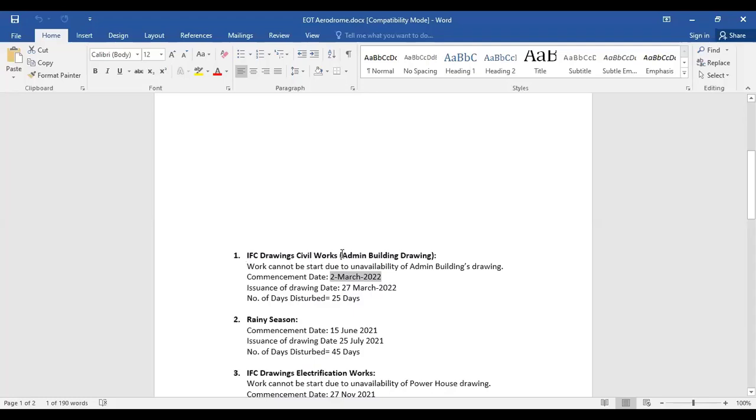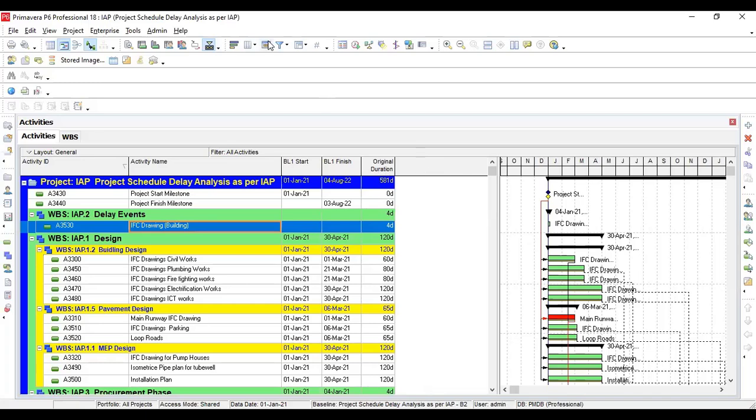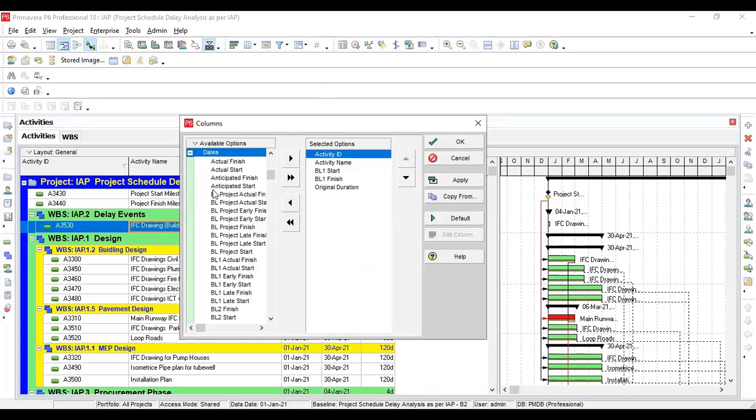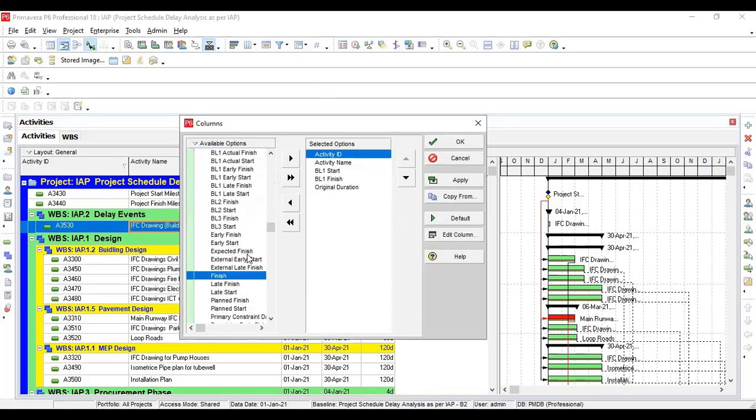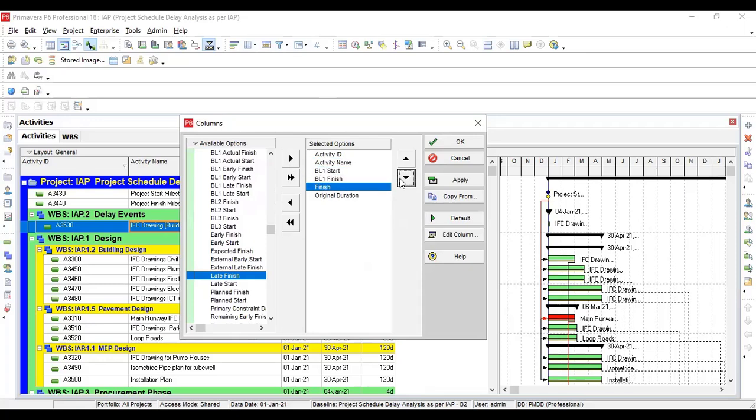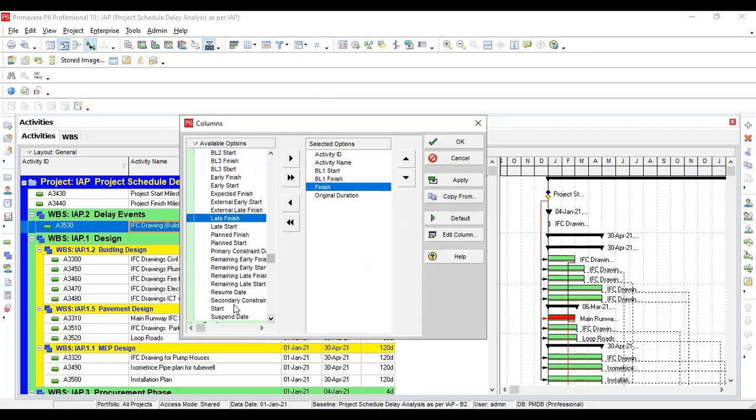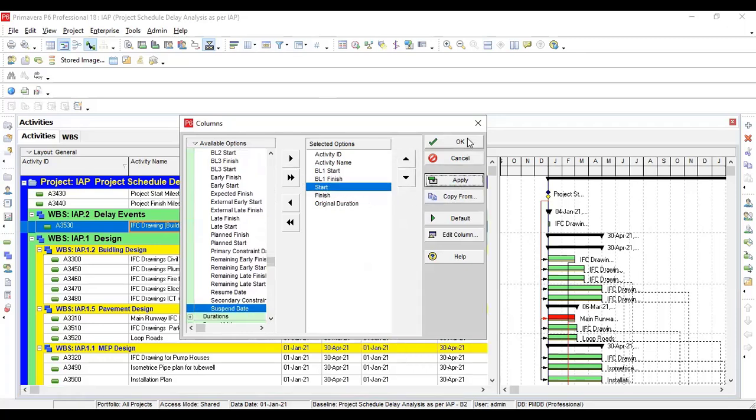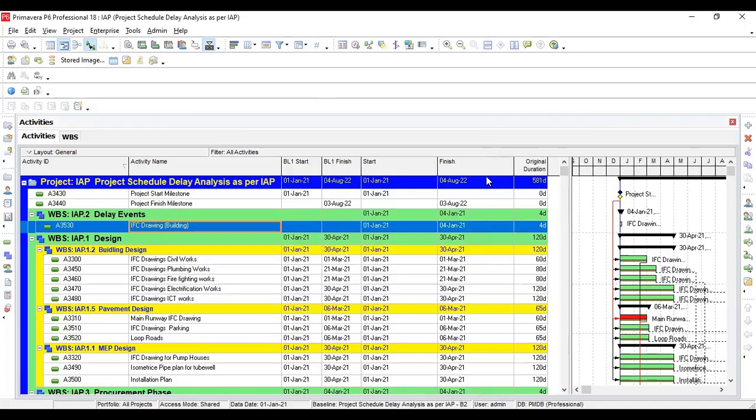I'm also going to share a slide of Primavera P6 dashboard to showcase more columns to get more information, because we need those columns which are going to show our real-time actual dates which we are going to incorporate now. Before that, every activity was part of baseline and we have logged that baseline, so now we need extra columns.